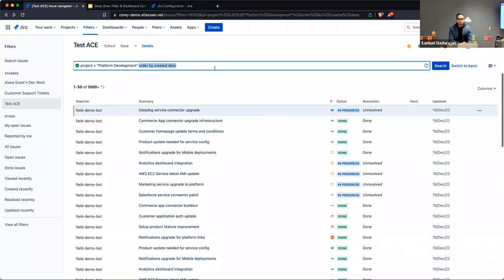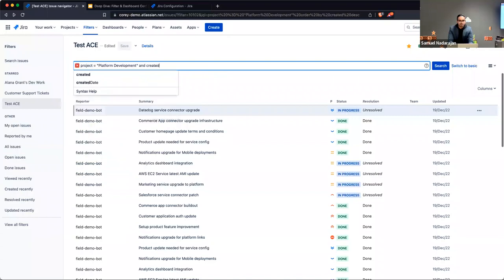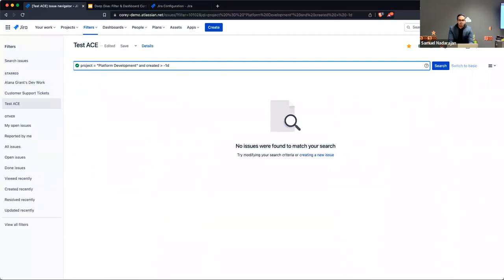Going back to Jeff's use case — when we talked about JQL we covered time functionality. If you wanted to see every morning at 10 o'clock how many new bugs were created, you'd include 'created is greater than -1d' (negative one day). This would show anything created within the last day.